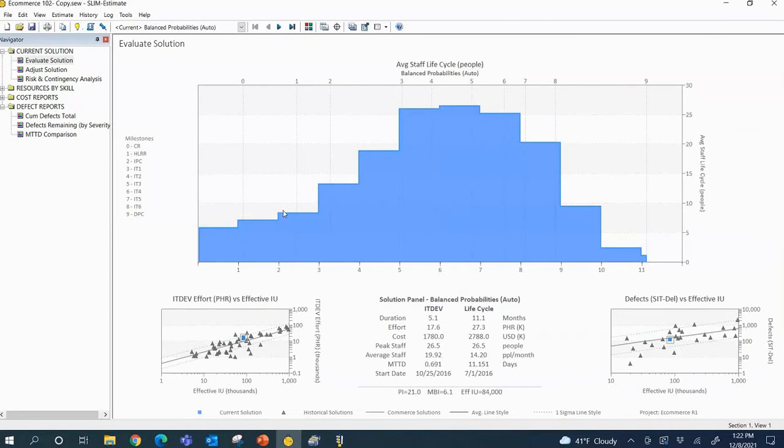And then here up top, I've got the staffing profile showing me, it's actually a Rayleigh curve, representing how I'm allocating my resources to the project. So we use the curves to represent staffing, cost, effort, and reliability. And these are flexible, by the way. We can create other resource profiles. For example, if I'm doing an agile scrum, this could be more of a box shape, right? So we're flexible here on how we set this up.